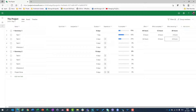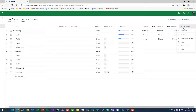You can also change Effort Remaining manually. For example, I planned 32 hours and worked 8 hours, but I now realize I need not 24 more hours but 40 more hours. If I put 40 hours for Effort Remaining, it means I will need to work 40 more hours to complete this task.